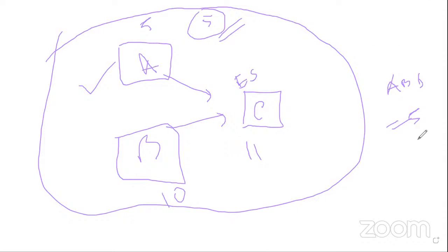What is the significance of having negative float? Negative float means there is already some problem that occurred in the network diagram. You are already behind the schedule. All right, you are already behind the schedule. That I showed you earlier, the negative float.